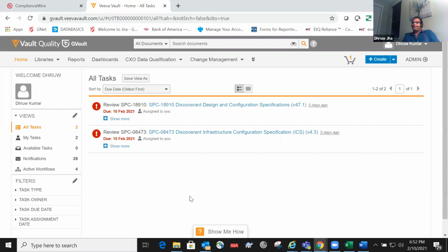I was the only lead here, so I divided the modules. Pune team takes libraries, Calcutta team takes reports, and Bangalore team takes dashboards.